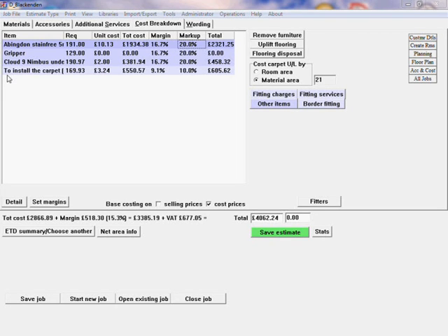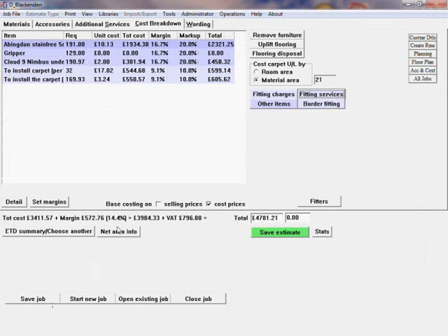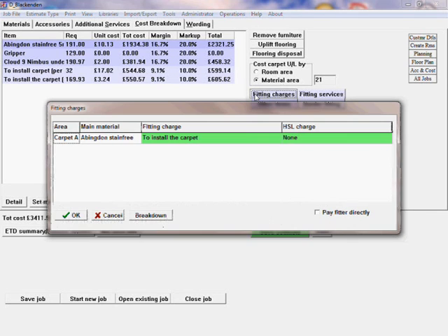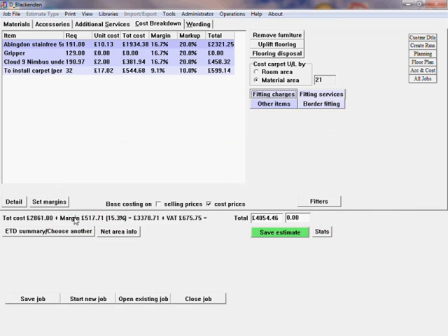The area-based installation charge gives a good guide to the installation cost, but we can alternatively save a number of man days for the fitting. To do this, we will click on the Fitting Services here and select to have the required man hours at the appropriate rate. We see that the cost comes to a similar figure as the area-based charge, and we now select to remove the area-based charge, and thus cost using the man hours charge.